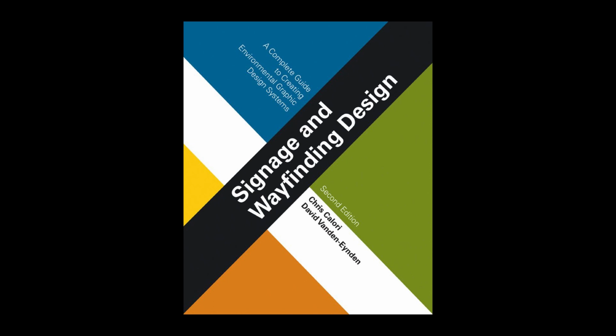Product literature provides information and specifications on signage components, such as lighting fixtures or digital display units, which the fabricator purchases from outside manufacturers. Production prototypes are effectively samples of the actual, completely fabricated and assembled signs, with one prototype typically provided for each sign type.